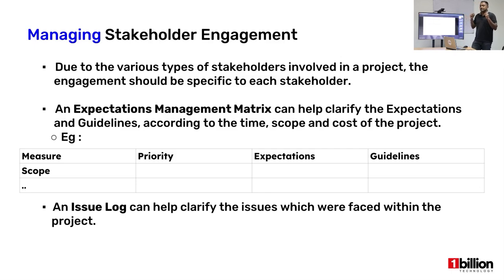So when it comes to issues, it's best to log them by their time, their importance, and by whom that issue is raised. So an issue log can also be really important in managing stakeholder engagement.